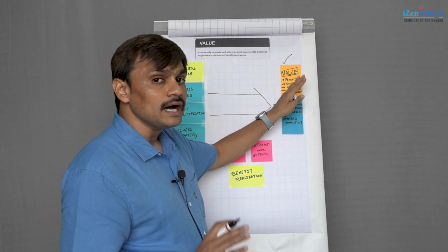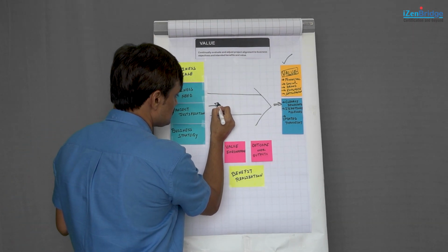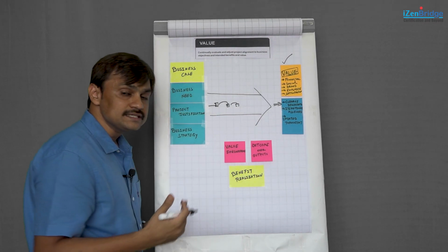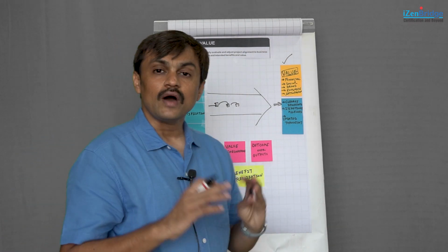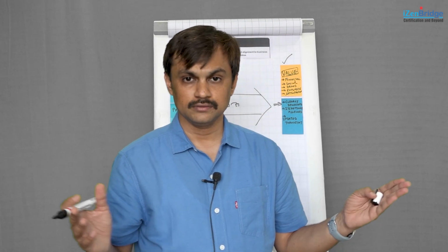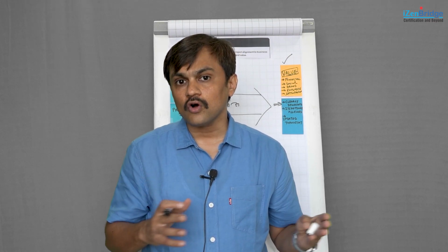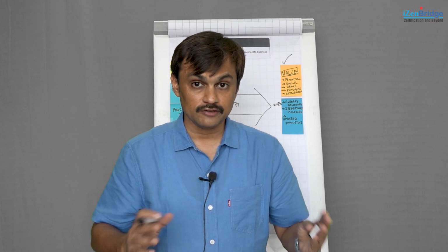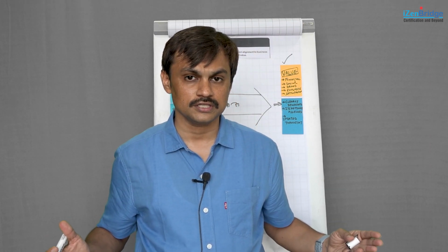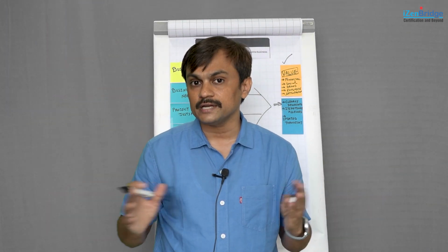Once we have a clear identification of value, then throughout the project when we are running this, we need to revisit this value again and again. So, it has to be iteratively assessed. See, the environment is changing. You started the project of reducing the operational cost by, say, 10%, but now the environment has changed. The bigger component of your cost was, say, fuel, and the fuel has gone through a 30% raise in price. Now, how should you handle the operational cost, because even after reducing this 10% the fuel price is anyway going up. So, overall it may have an impact.